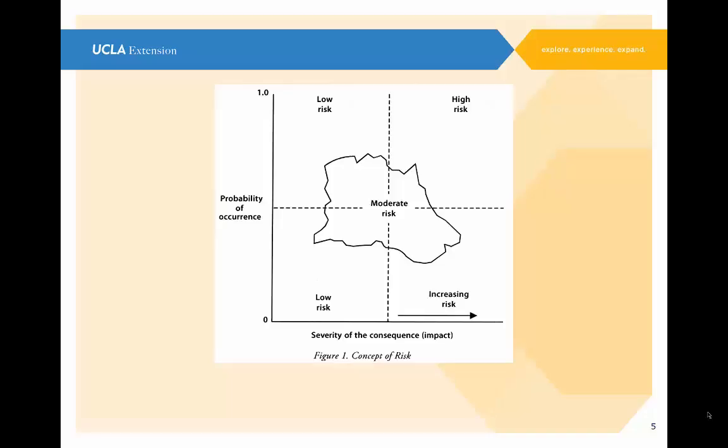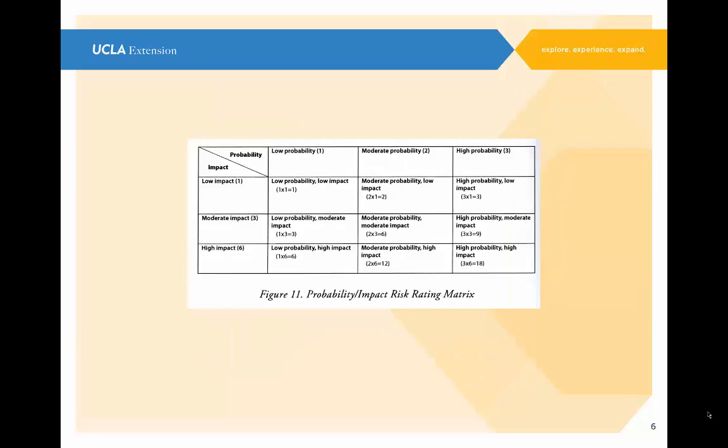And sometimes it's very hard for us to assess what that probability number is. And so quite often what a lot of project managers do is they just figure out, hey, is it above or below twenty-five percent, fifty percent, seventy-five percent, one hundred percent? And often it's very smart to bring in some of the subject matter experts that will be working on the project that know some of the areas of the complexity or technology or whatever and make them a part of the whole process. And then when you have a risk, then the two things shown on this slide that we really want to accomplish is we want to figure out how severe is the impact? Is it an impact on cost, on schedule, on quality or performance? How big an impact is it going to be? And then we want to know what the probability of the occurrence is going to be. If we have something that's going to be really severe but the probability of that occurring is like one percent or half a percent or almost nil, we may decide that we're not going to do an awful lot about that. So these are the kind of decisions and the kind of thought processes you want to go through as we go forward.